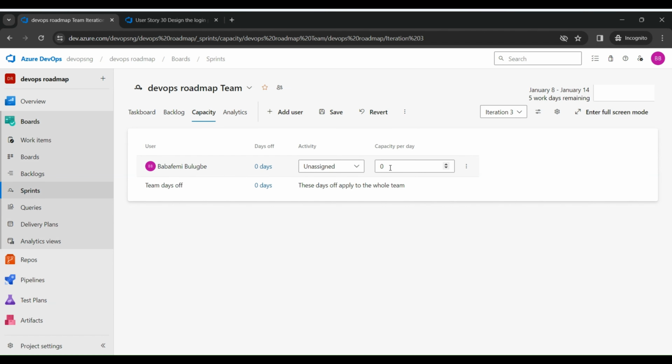This will add all the users that are actually members of this project. For this user, the capacity is going to be 6 hours per day to be able to work on this project. That means if I decide to set effort on those tasks, the number of hours that I need users to work.